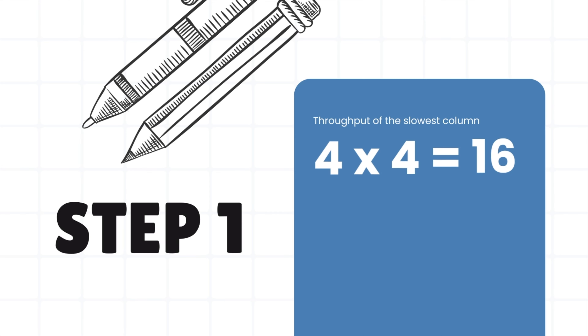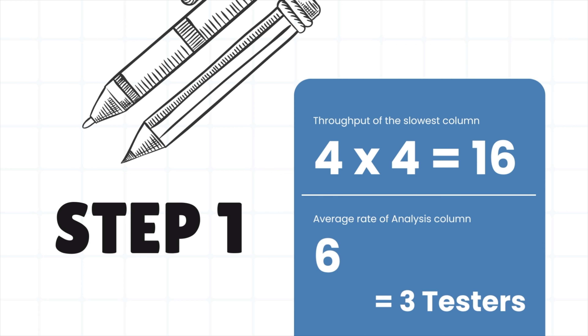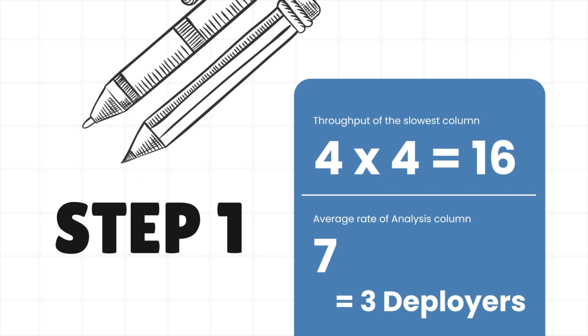To calculate the other WIP limits, divide the throughput of the slowest column by the average rate for each step. This gives us the number of people needed for each step to match the slowest step's throughput. The throughput for the development column is four items per month multiplied by four developers, equals 16 items per month. So the number of people needed in each column: for analysis, 16 divided by six items per month per person equals 2.67, rounding to three analysts. For design, 16 divided by five equals 3.2, giving us four designers. For test, 16 divided by six equals 2.67, rounding to three testers. For deploy, 16 divided by seven equals 2.29, rounding to three deployers.